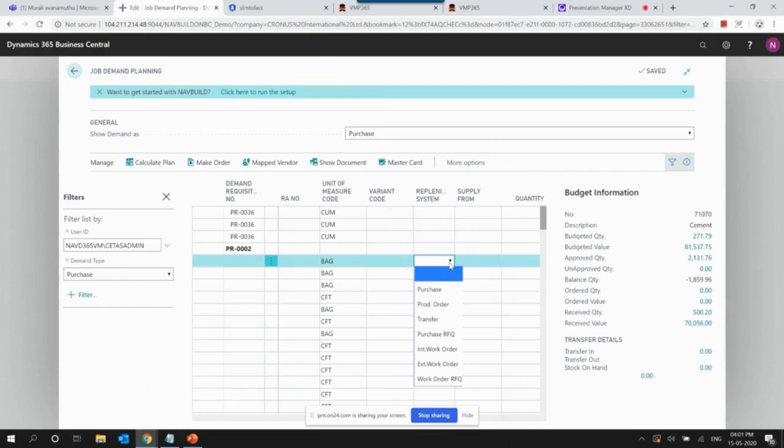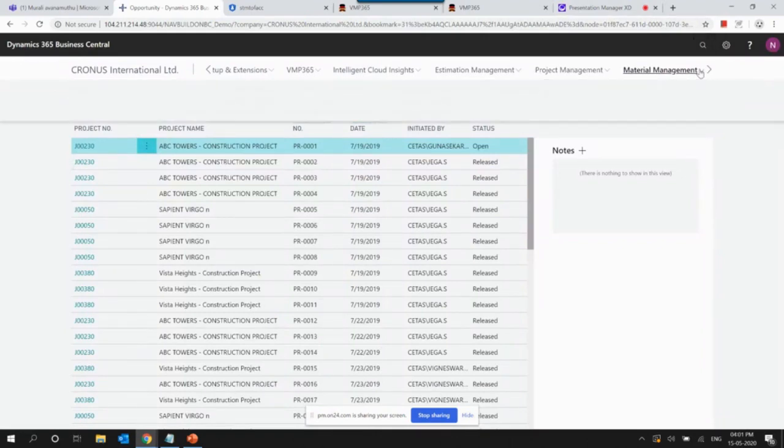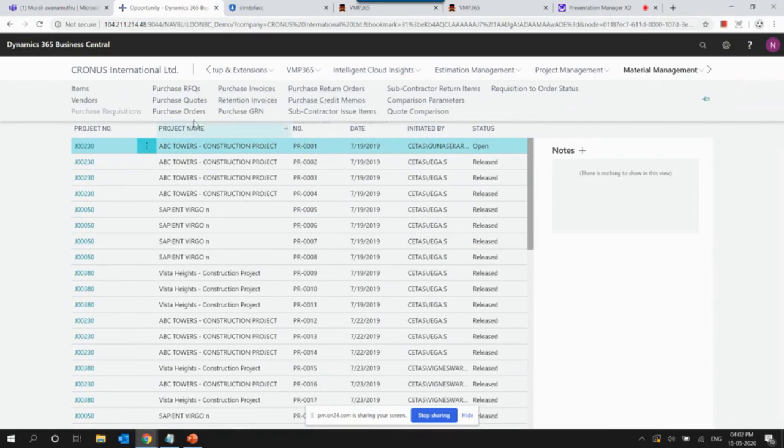Or let's say there is also a process in the company where, as per our company policy, it is mandatory to receive 3 quotations, do the quotation comparison, and only then I can release a purchase order. Assume that is also available in the system. So these are the flexibilities or options available for the procurement team. Even a scenario of partial quantity can also be made available in the system itself.